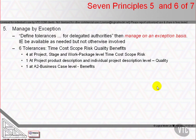Management by Exception defines six axes of variation in project performance: time, cost, scope, risk, quality, and benefits. Second, it sets limits on the authority delegated between each management level over the allowable variation from the baseline plan within each of the six axes.